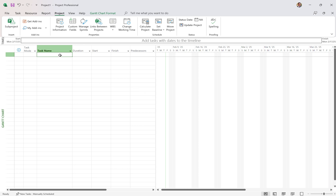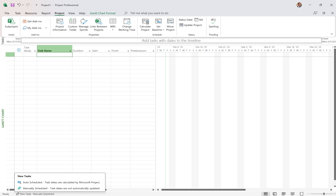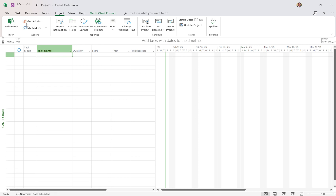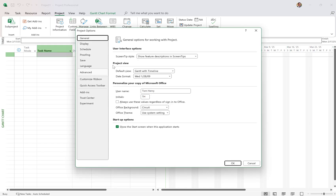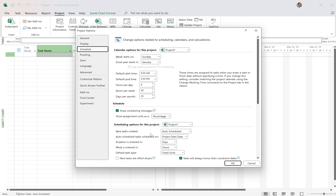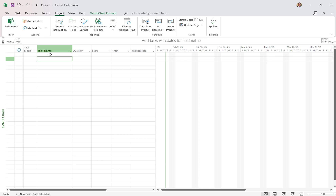First thing you want to do is come in and put the names — the tasks — of your project in here. Now, by default, Microsoft Project will manually schedule these tasks. But the first thing I always do is click auto-scheduled. A nice tip: go to File > Options, and in Schedule, you can set that new tasks are auto-scheduled for all new projects, and you never have to flip that again. Auto-scheduled means we're turning the scheduling engine on; manually scheduled turns it off.